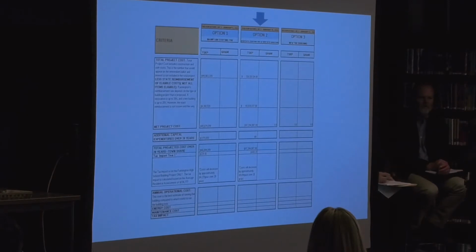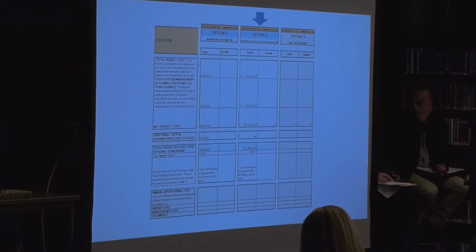They have certain rules and regulations that have to be met. For example, if they do work on the entry to Monteith Road for the school, while it might be an improvement and help the situation for traffic to the school, the state doesn't pay for any work on Route 4, I believe it is there. So they would have to allocate the amount that was appropriated for that construction, and it would be deemed ineligible. And there's a number of those items, and we'll go through that as we go through this process.